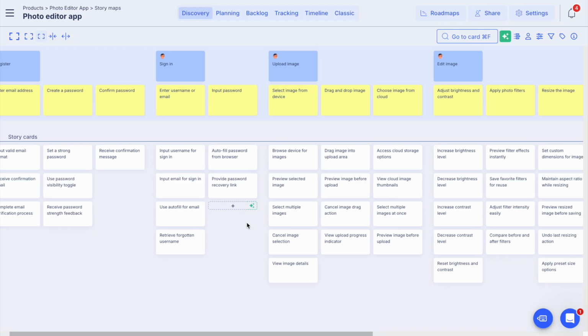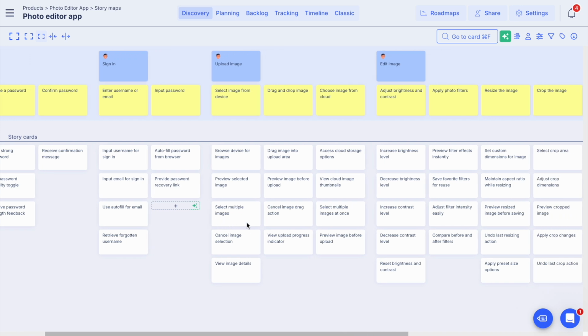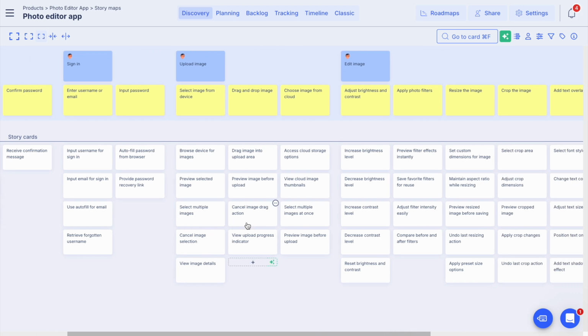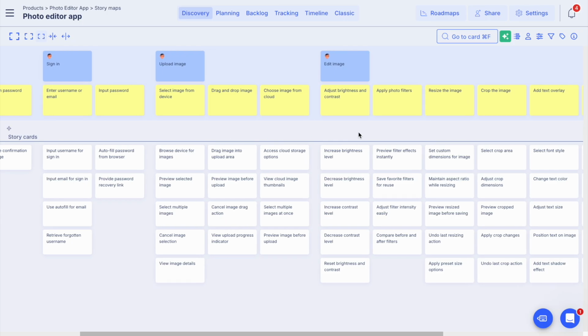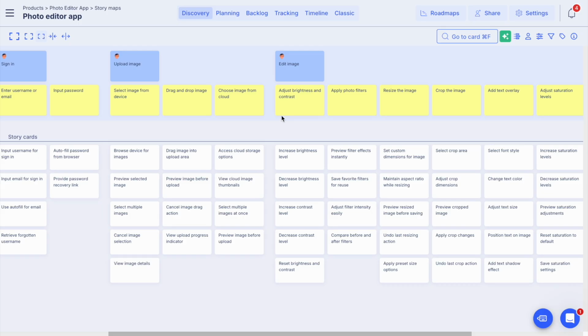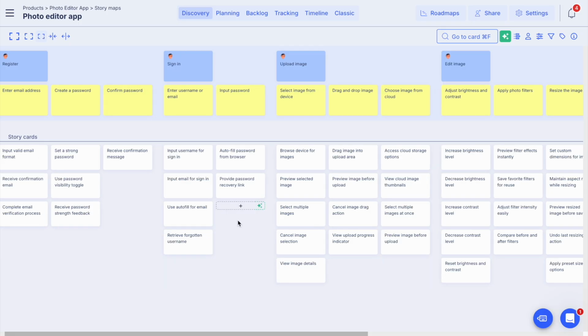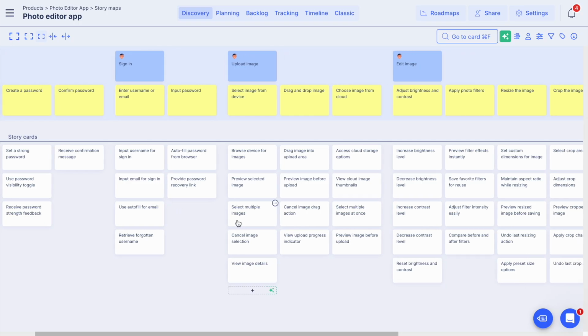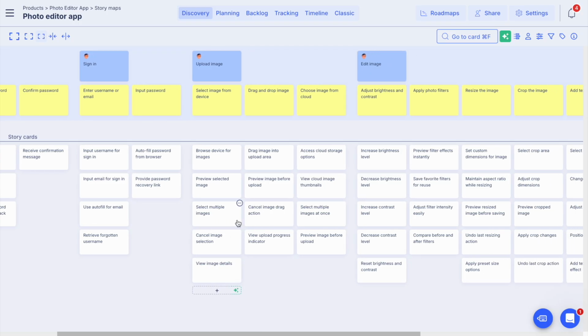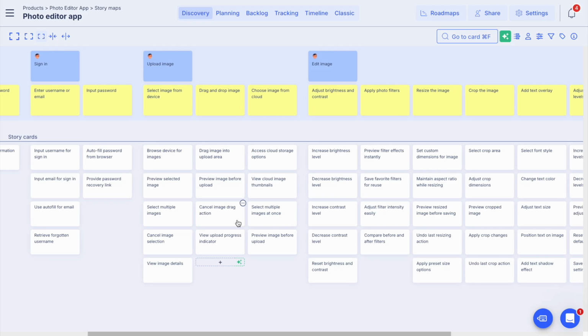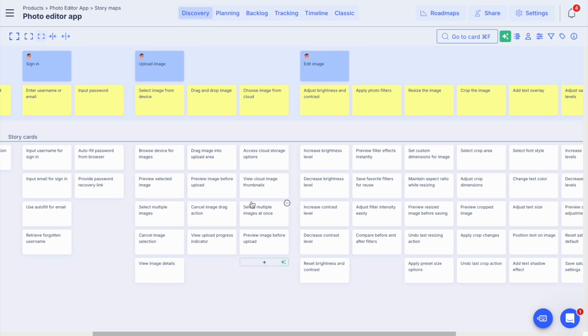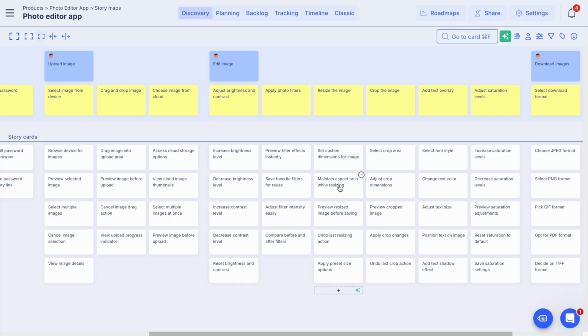Therefore, our first goal is to define the walking skeleton, the absolute minimal path that gets our user from start to finish. It should be a complete end-to-end journey, but it's not a fully functional solution. The product backlog that we have mapped out with our team and customer, of course involving Alex, the user who will eventually use this solution, holds the entire journey start to finish, also including all those features which we eventually want to publish.